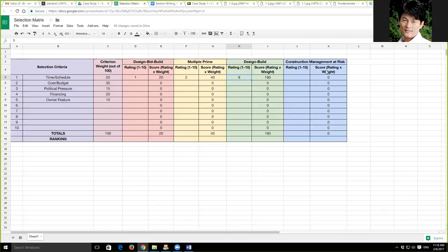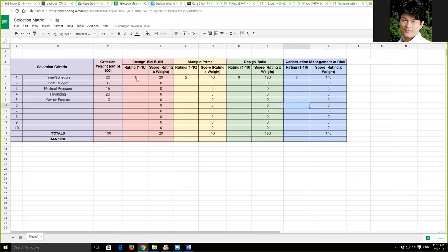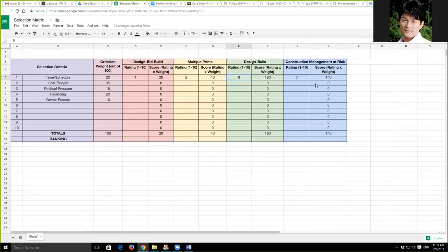The score you get is the assigned weight of that particular criteria multiplied by its rating. For example, if design-bid-build gets a rating of 1 with a weighting factor of 20, that's 20 points. Multiple prime gets a rating of 2, multiplied by 20, you get 40 points. You assign design-build a rating of nine out of ten — meaning design-build is really good for managing your schedule — and nine multiplied by 20 gives you 180 points. Then you continue for cost/budget: design-build may potentially save costs if teams work together; construction management at risk saves costs because they function as both construction manager and general contractor, putting their own stake on the table.